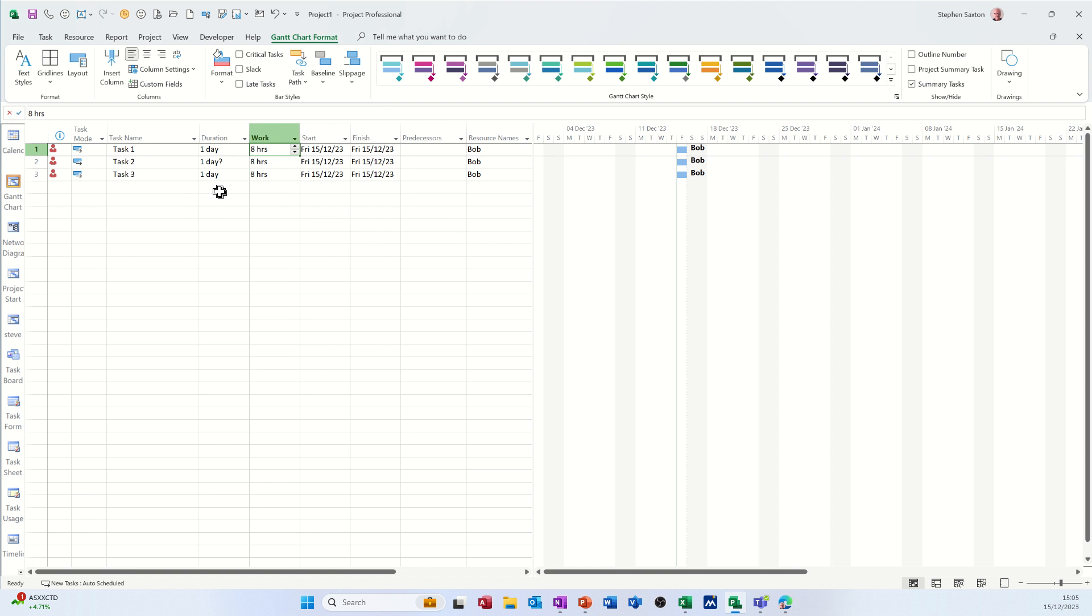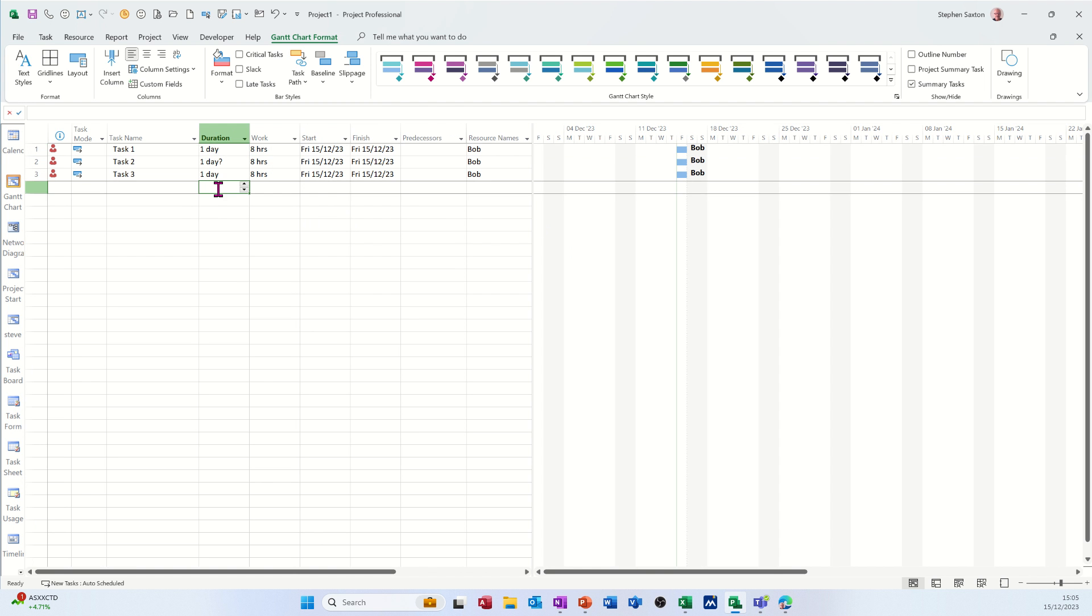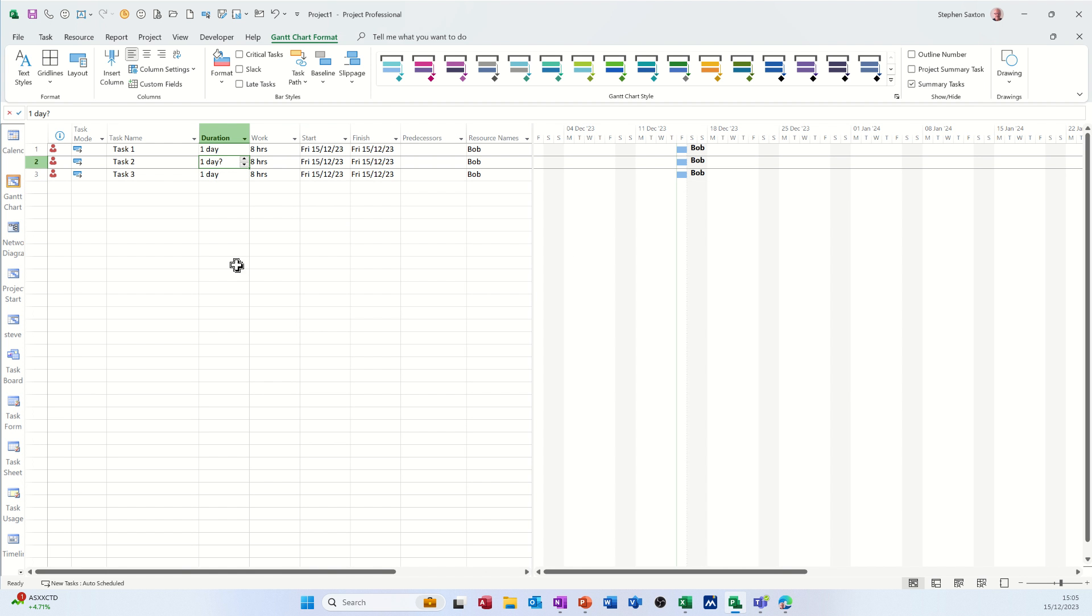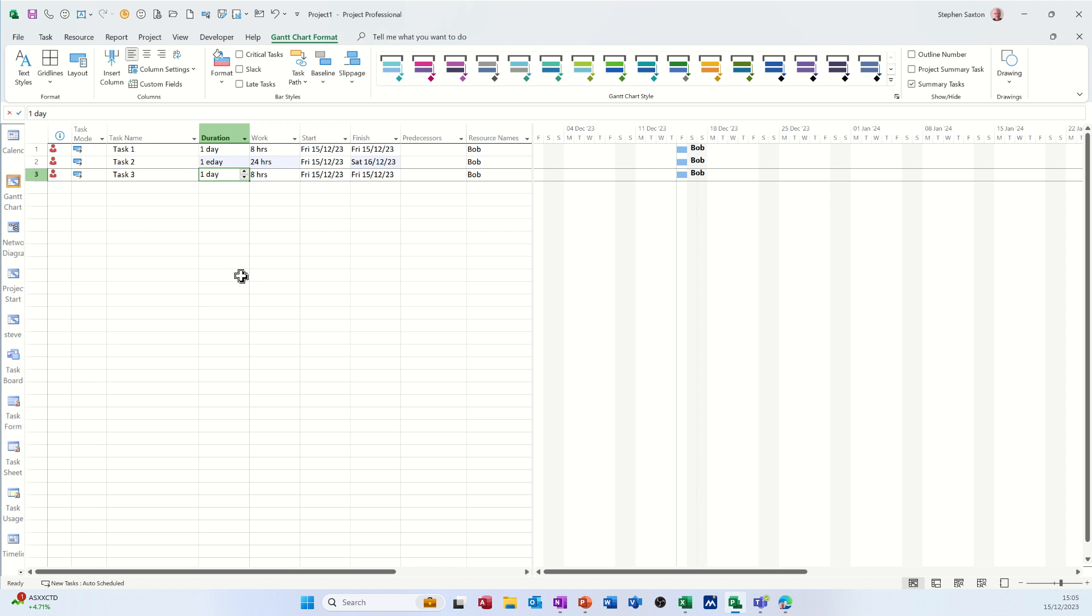So you can see everything's just eight hours because all of these are just at the minute one day tasks. Now if I put one e day like that, see what's happened there straight away? That's gone to 24 hours.